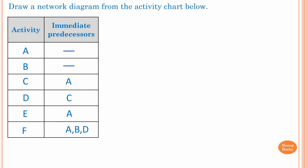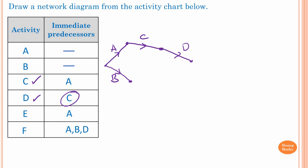Activity A and B have no prerequisites, so we start here — this is A, this is B. C has an immediate predecessor of A, so we start C from A and connect them. Then Activity D: we need to complete Activity C first. Looking ahead at Activity F, B and D need to connect together, so D should be connected to B as well. This is Activity D.